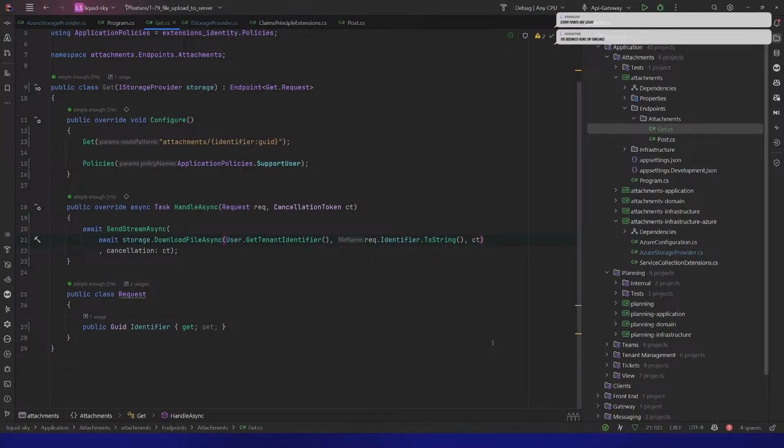The important thing I think is per team of developers working on a product that they have a reference. So team A's, yeah, another story points discussion. Team A's 3 point might not be Team B's 3 point, but they should still be their relative 3 points so that you can get their scale. If you try and hold the entire organization to one story, and I've seen this, it gets very messy because some teams look like rock stars and some teams look terrible. So doing a single story per organization is challenging. Story points should not be about timelines.